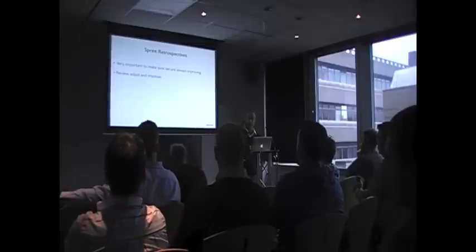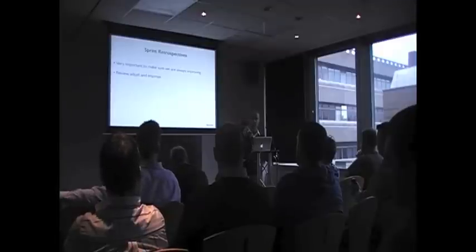We did the same yesterday with Tim, who's in the room today, at the hackathon. We'll talk about it in a bit in the main room, but it worked really well. It was Pico Scrum, Pico sprints. We had hour sprints, basically time-boxed sprints where the developers in the room picked some of the bugs that were in the Umbraco bug list, and gave them an hour, basically.